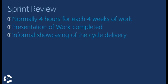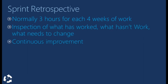The sprint review occurs after the sprint is over and the final product for that sprint is presented to the product owner. This is normally a four-hour meeting when sprints are four weeks long. The sprint retrospective is a three-hour meeting when sprints are four weeks long and inspects what has worked, what hasn't worked and what needs to be changed. It is a critical meeting to ensure continuous improvement.